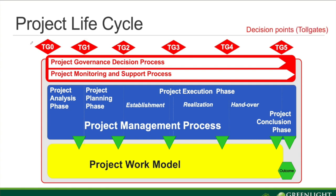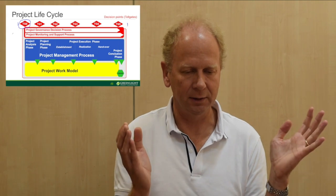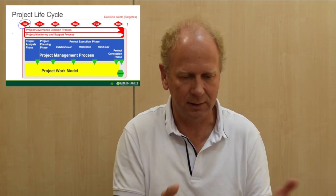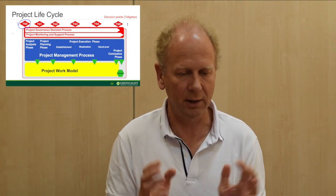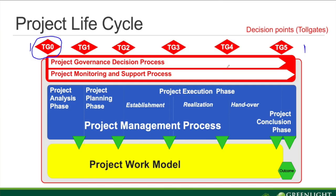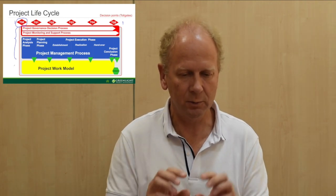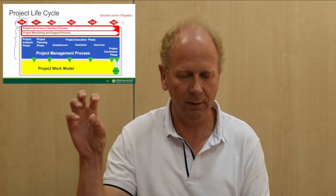This is the project lifecycle again. Here you can see target zero and target five. Target zero is a decision we make to start up something — it could be a very formal decision or less formal. Then we divide all processes into the three levels: red, blue, and yellow. The red and the blue parts are basically always the same, independently of what type of project we are running, because we need to decide, govern, and manage the project on the steering level.